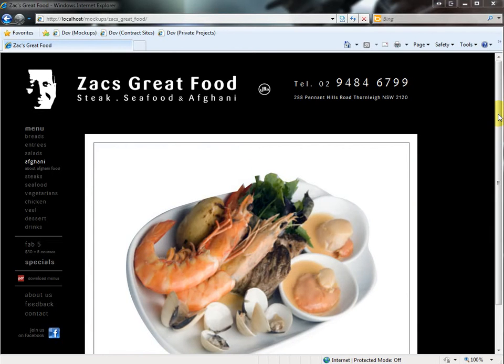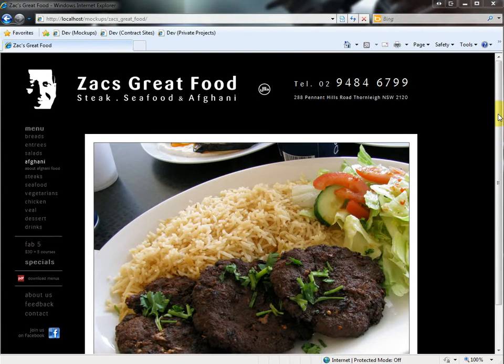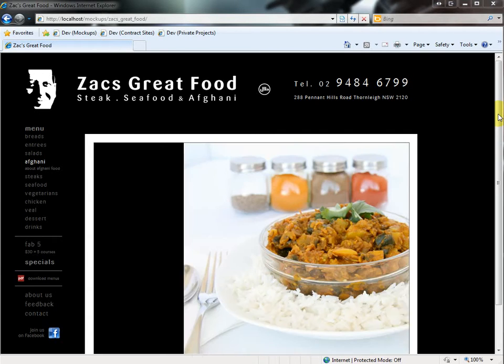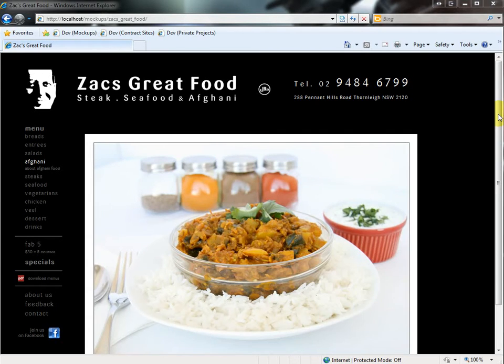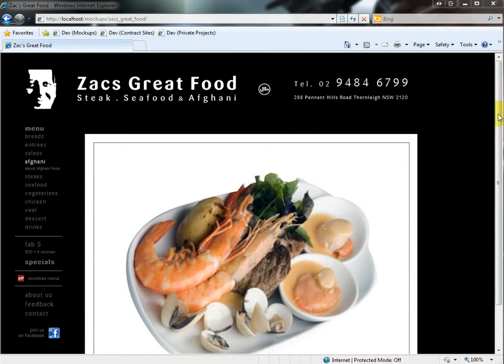I received a mock-up from the client, which I'll show you in a moment. From that mock-up, I created the HTML and CSS files and images, which again I'll show soon. And from there was one round of tweaks and changes. The client or a stakeholder of this project requested some changes. About 60-70% of those I was able to do, and others were a bit too much of a deviation from the approved design. So those have been put back to post-launch. So there will be some additional work on this project after it launches.